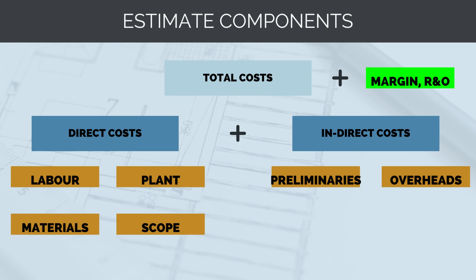Let's now look at what our cost estimate is made up of. Firstly, we've got our project costs. There are two types of costs: direct costs and indirect costs. Direct costs are costs directly related to the delivery of project scope, like the cost of asphalting a road or pouring a concrete foundation. Indirect costs are costs not directly related to a scope, but necessary to keep the project running, like management staff, site offices, security at night, and so on.